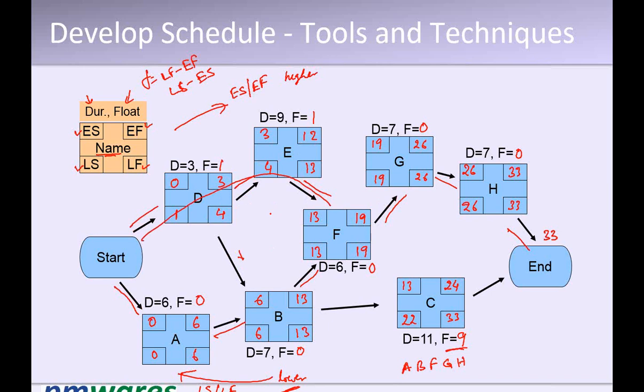So if you take DB, in this case we have 2 days float. Actually 3 days, but we can say 2 days. Maximum, if you say 4 between 6, it is 2. 3 and 6 is 3 basically. 3 days, correct. Okay. So basically this branch has no problem. The problem is on this branch, because it has a float of only 1 day. As soon as D is delayed by 1 day, E becomes critical, because the float on E becomes 0.